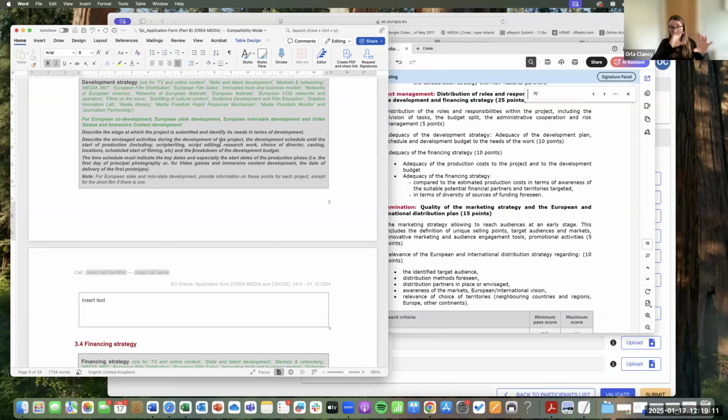So the person reading it can see at a glance, okay, well, they're going to the right market for them at the right time. And that would make sense because there's no point going to meet financiers before you have this done. So everything has to make sense.